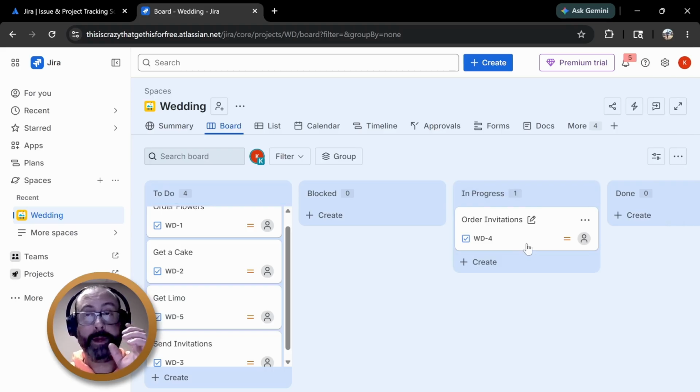So cool thing about Jira, it's important to point out, is you can start to create rules and workflows on top of these different interesting moments. So for example, there could be a manager behind the scenes who's listening to the blocked column or the in progress column. So the minute a worker moves something over to in progress, an email can be sent off to another individual to let them know that something's been started, which could literally initiate an entire other project and start moving work forward in a completely different context, which is, to me, really cool.